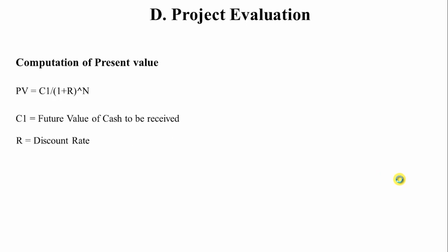The R is the discount rate. Now this is basically the interest rate, or you can say the income rate, the discounted rate, which you expect to receive over the number of years. So every company has their own hurdle rates, which is the discount rate over here. We're going to talk about this in detail as we go along. But understand this thing: if a company expects that its resources generate a 7% risk-free return, that is the discount rate over here. What is the amount of risk-free investment return the company expects to generate? It can also be a higher one.